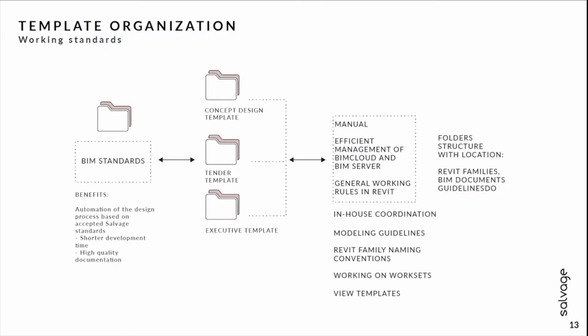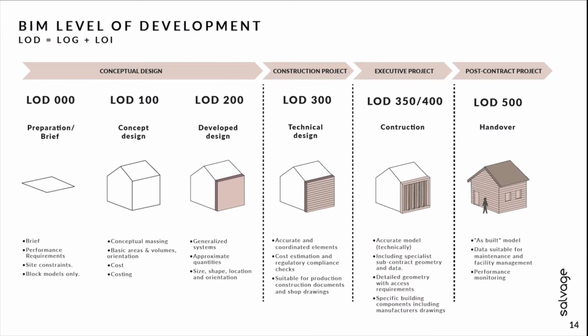And the BIM templates, which can speed up our work, increase the quality and decrease the effort. These are the templates which are created after each project, and they are constantly being created using our experiences to optimize and increase the efficiency of work. And the detail level of geometry and information is a very important aspect which needs to be understood in a team, when we need to stop modeling and start making drawings, and the other way around. It's very frequent that the effort of modeling is incorrectly interpreted. Good understanding of these aspects can generate a lot of time and money savings.